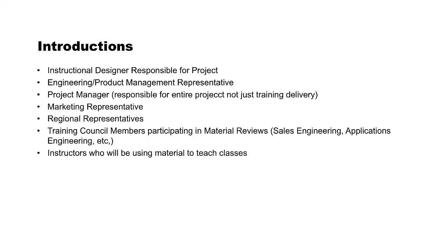You have to make a decision on who's going to be at the kickoff meeting. The core team that we had at the 2 places I worked is instructional design. You had instructional designers, and they could be people on the team or people that you've hired externally, but they would be the instructional designer responsible for the project. And they're the ones going to be leading the meeting. You'll have engineering and product management representatives. So that could be anybody from engineering. It could be a development engineer, could be a field engineer, and your product management would be your product manager, the person running the project or managing the product development.